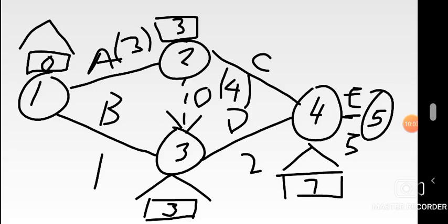From 4 to 5, there's only one route. From 4 leading to 5, there's only one route leading to 5. Therefore, we start from the number we've just allocated at that node, which is 7, going to the next one. So it's 7 plus 5 giving you what? 12. Let me just put an arrow for how the structure we've been drawing will also look on 5. So it should have 12, because 7 plus 5 is 12.